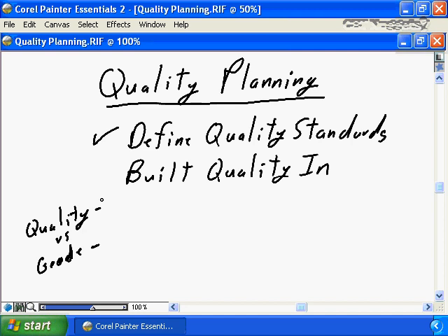Is the project acceptable if it is 100% fault-free? And I would suggest in most projects we deliver in business today, the expectation of 100% fault-free is an unrealistic expectation. Time is money. Time spent on ensuring each and every piece of your project is 100% fault-free is potentially time that is not a good investment for your organization. And as we'll discuss a little later in this nugget, there may be instances where applying an 80-20 rule, applying 80% of your quality process to the 20% of the function that delivers the most business value may be appropriate.